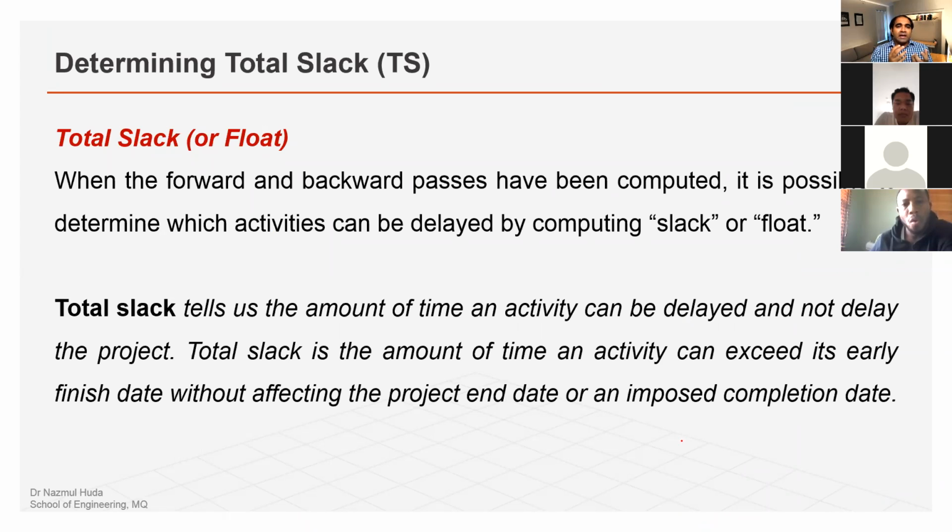So it is known as total slack because this is the total amount of slack we have in each project chain, each network chain, right? So if we have, for example, 15 days of slack in one of the chains, that means we have 15 days for the entire duration of that project network diagram. If we use 3 days out of 15 days, the remaining slack we have is 12 days. That is the total slack.